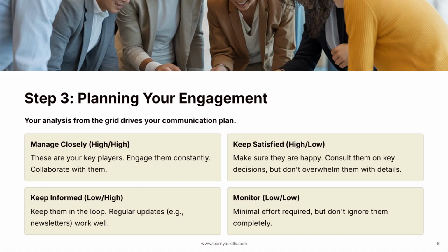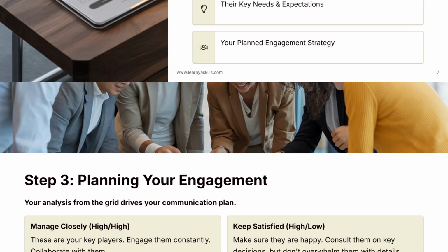For the Keep Informed group, like the broader employee base, you keep them in the loop with regular, one-way communications like newsletters or status reports. And for the Monitor group, you expend minimal effort, but you don't forget they exist, as their power or interest level could change over time.